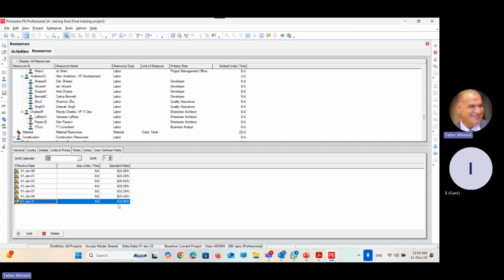Just assume we have steel work, and the steel now is, let's say, 1,000 euro per ton. During the work, suddenly the price increased in the market, and the price of the iron is 1,200 now. All I have to do is go to this tab and add. Primavera will say, now today is 11 of November 24. What is the new cost at this point? It is $1,200.